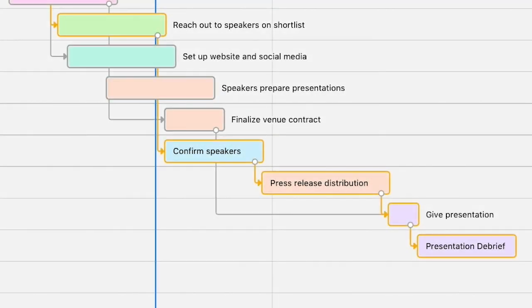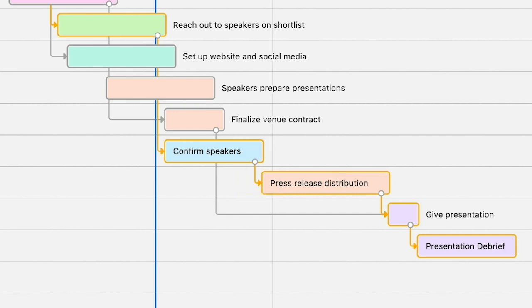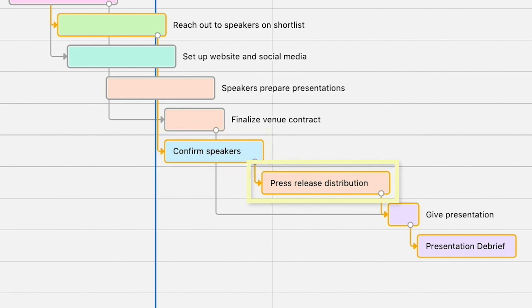In some cases, a project plan or schedule will require that activities be performed in a certain order. For example, you need to secure keynote speakers before sending out a press release. You can visualize these dependent relationships between different tasks with arrows called dependencies connecting the different bars. The arrow reflects the direction of the dependency. The base of the arrow comes out of the record that needs to be completed first, which is called the predecessor, and points towards the record that can only be started after the predecessor's completion, which is called the successor.